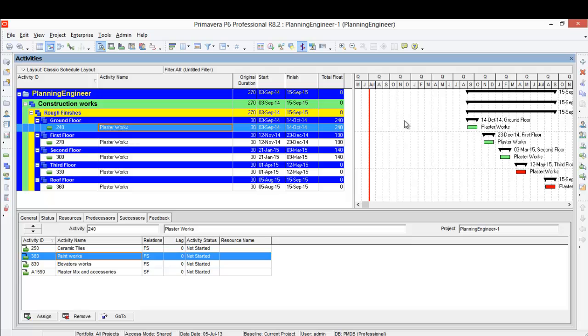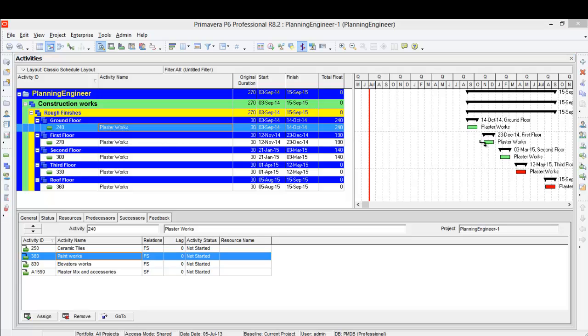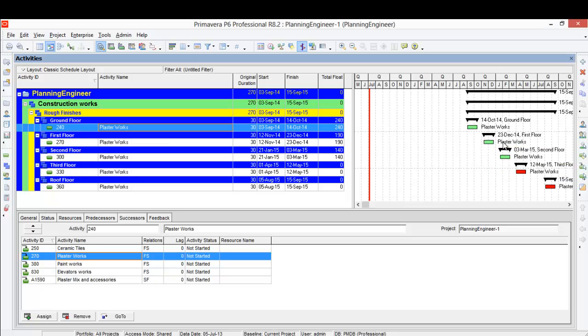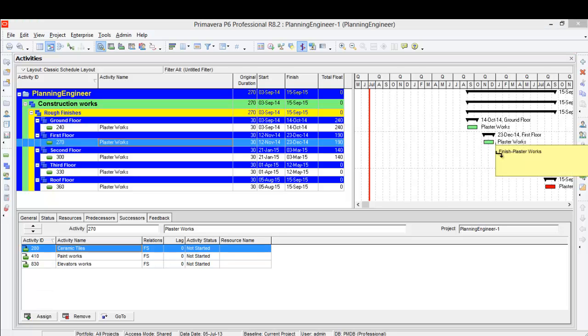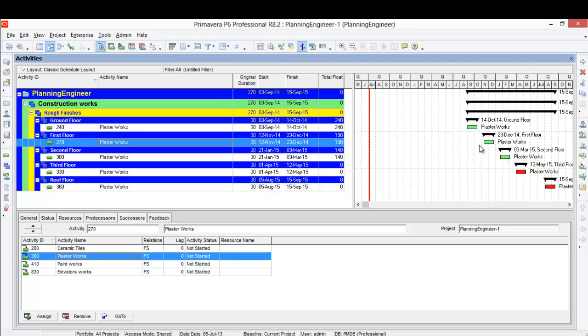First of all, I will link the plaster work to itself. It means that the ground floor should be finished before the first floor starts. And let's see how this will affect our total float. Let's do this relationship and show the relationship to be clear.